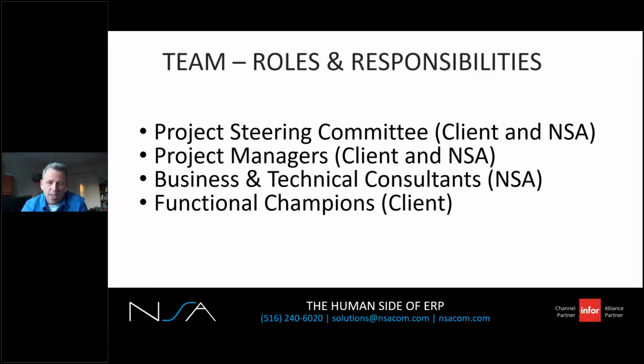You'll need some project management internally as well as externally with your consulting partner. So typically the internal project manager has a very detailed project plan, and the external consulting company will have theirs, which may be comparable, much less detail. So the role of the PMs, well, is to ensure the overall objectives are met, coordinate resources, define and assign tasks, manage the scope, schedule, and budget of the project. Also to decide when to escalate issues to your steering committee.